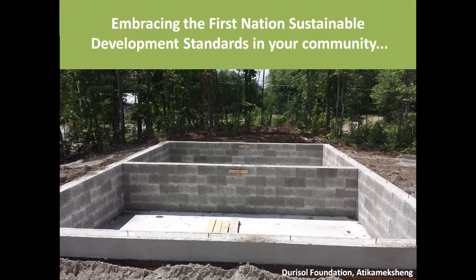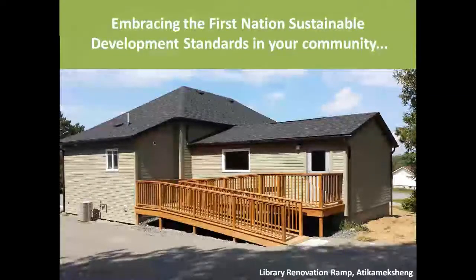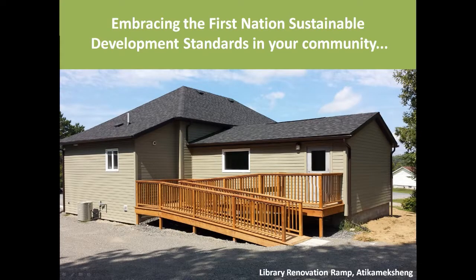So it's been a year over our originally agreed completion date, and we're hoping to have them completed by March. But that's just something to consider of who you hire to put your homes together, and making sure they're going to be able to get it done on time. So we've had members assigned to the units who've been stuck waiting all this time without a home.